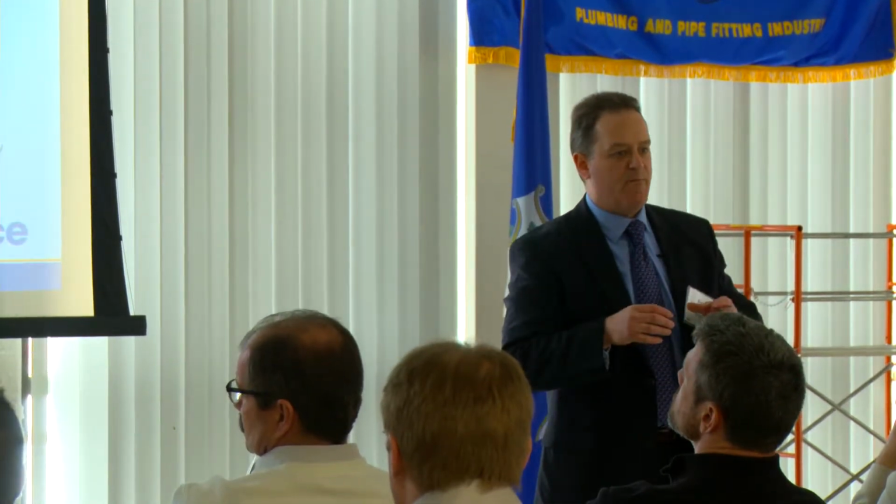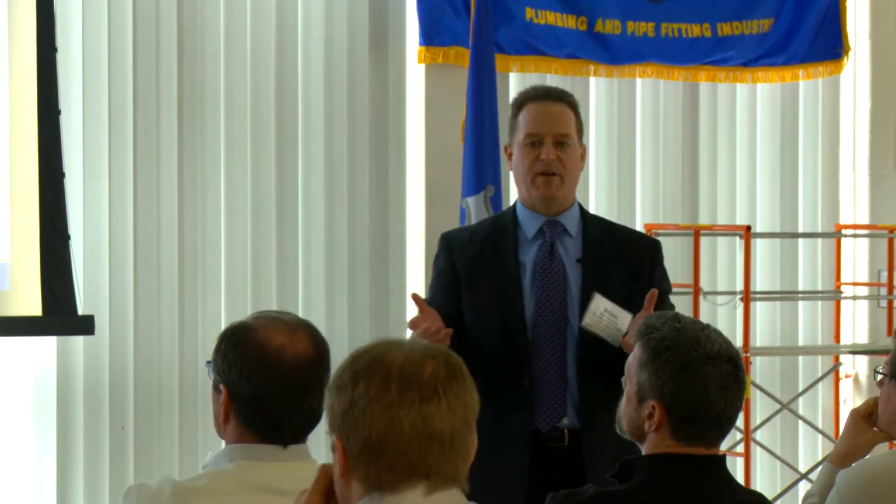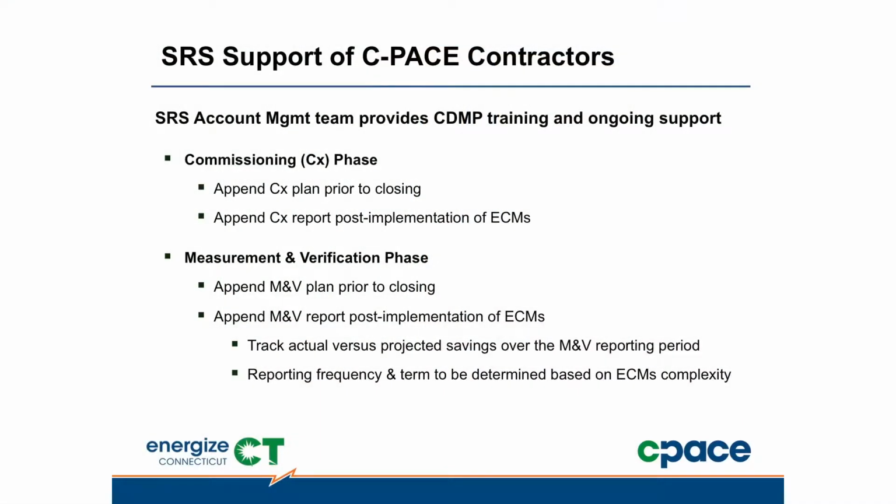Also, some of you may not be familiar with a formal commissioning process or a formal measurement and verification process. Again, we've built some general templates or modules to help support this. And generally speaking, it's relatively straightforward, but we are going to want to see that there is a commissioning checklist or plan in place to ensure, again, put yourself in the shoes of the third-party capital provider, right? They have to ensure, are we getting installed what we agreed in the finance agreement to get installed?